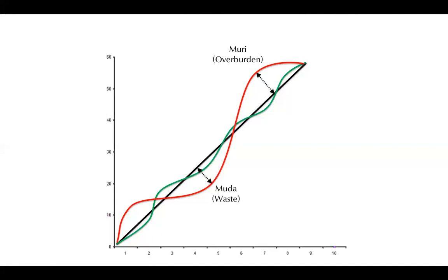But where we see a cycle of these things, where we have things wobbling from below to above and back again, that kind of wobble, that's where I would question your original judgment. And I admit that this is only a tiny little segment of these curves. It might not be sufficient basis to worry. And also, we don't know what the causes are. If we can identify the causes, it might be that, again, there's no reason to worry. But the wobbliness of these burn-ups, to me, that's a bigger problem because it means that we have some cycle of hurry up and wait going on. And that kind of thing usually generates technical debt.